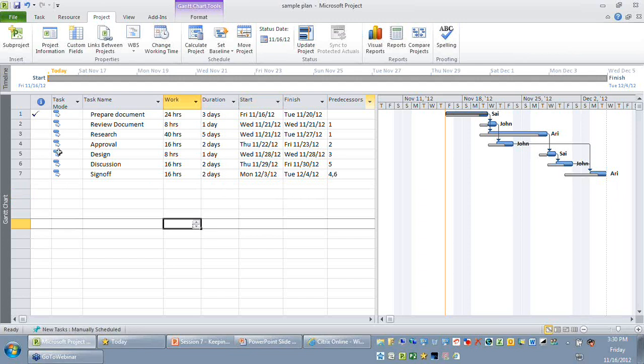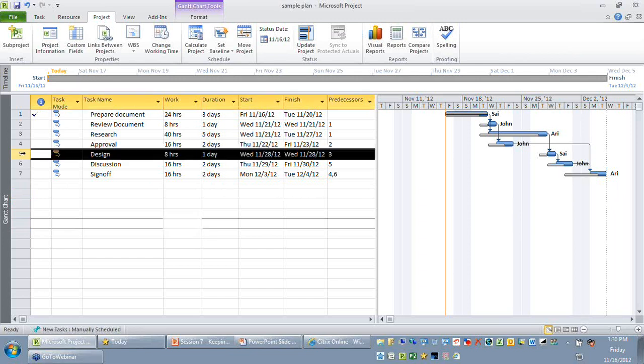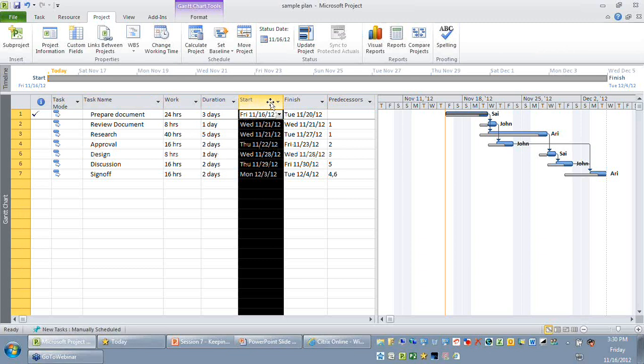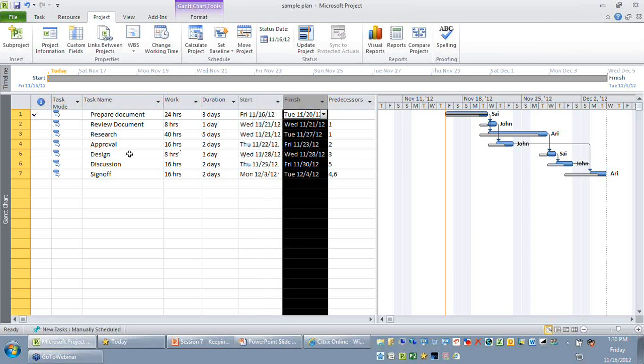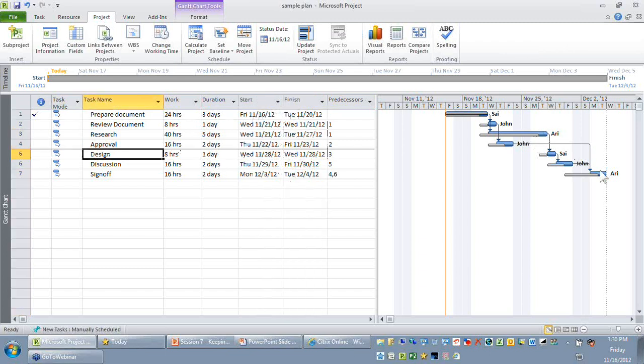The second step is, we might want to include this change request now. But remember, before you add the change request, you need to remember what your current start date and finish date of your activities are. The reason is, after adding the change request and changing dependencies, you might see that there are certain activities that get delayed because of the change request, and the customer should be aware of those impacted activities.